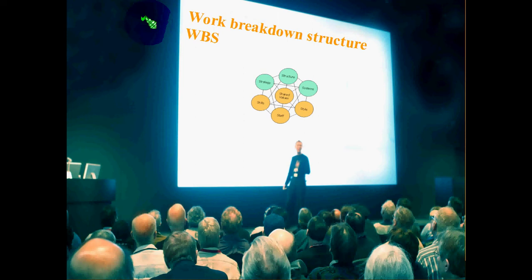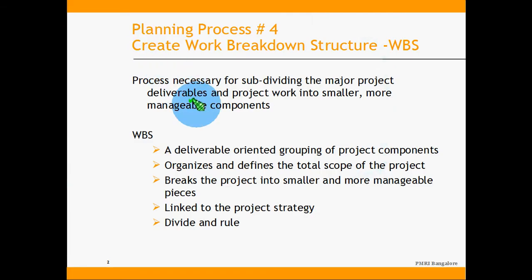Then we collected detailed requirements, because so far we were operating through high-level requirements provided by the statement of work. Now it's time to elaborate these into detailed requirements. Once those detailed requirements are done, we define the scope, and then the next step is decomposing the scope into a work breakdown structure — a deliverable-oriented grouping of project components that organizes and defines the total scope of the project.